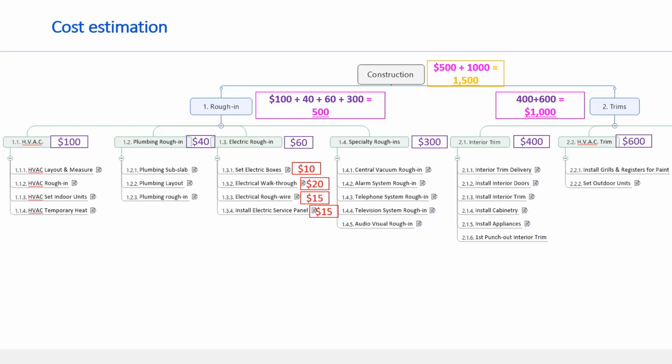And that's it. I hope with this discussion, you got a good idea about activities, work packages, control accounts, and how the cost is aggregated from activity level to work package level to control account level and to the project level. In this approach, we started from the activity level, then moved upward to the work package by aggregating the activities. Then we moved one level above to consolidate work packages into control accounts, then went up one more level to consolidate everything at project level.